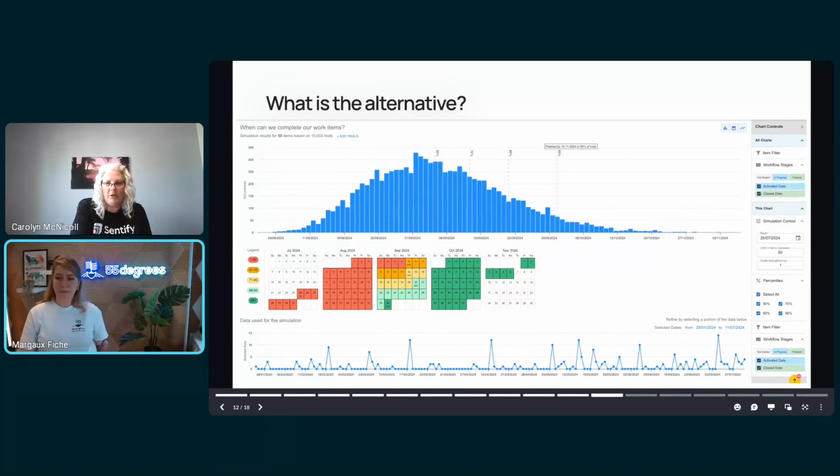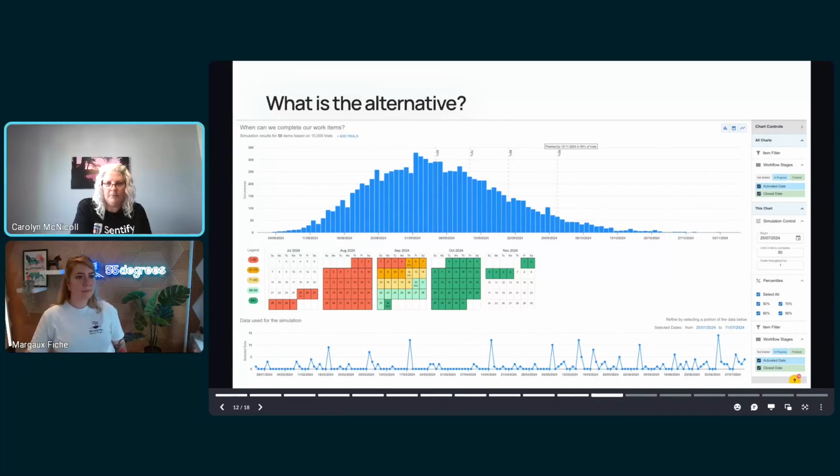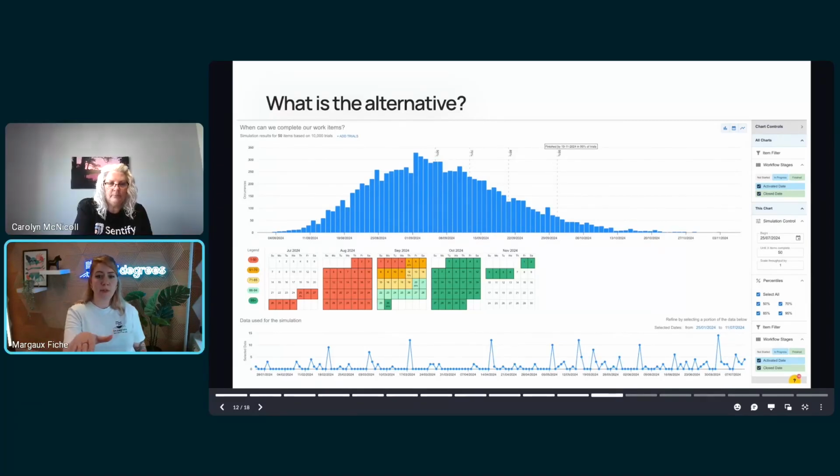Yep. Yeah, you can drive really much anything as far as boundaries go. There's no steadfast rule that you can only look at this number of items or this number of days. You get to pick and choose where you want to start measuring from. You can put a range if you don't really know, because here we're telling you 50 items, but we have no idea what those 50 items in your backlog are. If it's a lot of epics, is it a lot of things? It's just 50 items that should be roughly similar to what you've done in the past. So it's not as granular as that.